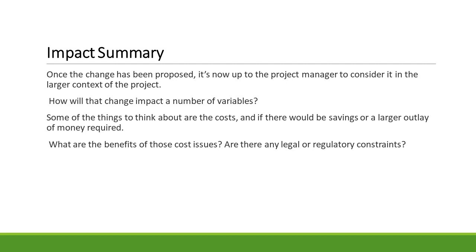completion. 3. Resource evaluation. The impact on resource allocation is analyzed. This includes manpower, finances, equipment, and other necessary assets. 4. Inter-project relations. The potential effect on other concurrent projects is considered.